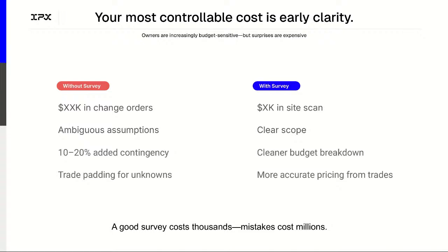An RFI can become a change order, it can escalate into a construction change directive, that can, hopefully not go into arbitration, right? That ultimately goes into litigation. So by eliminating as many RFIs, you're literally not even inviting that whole process of liability into the project.